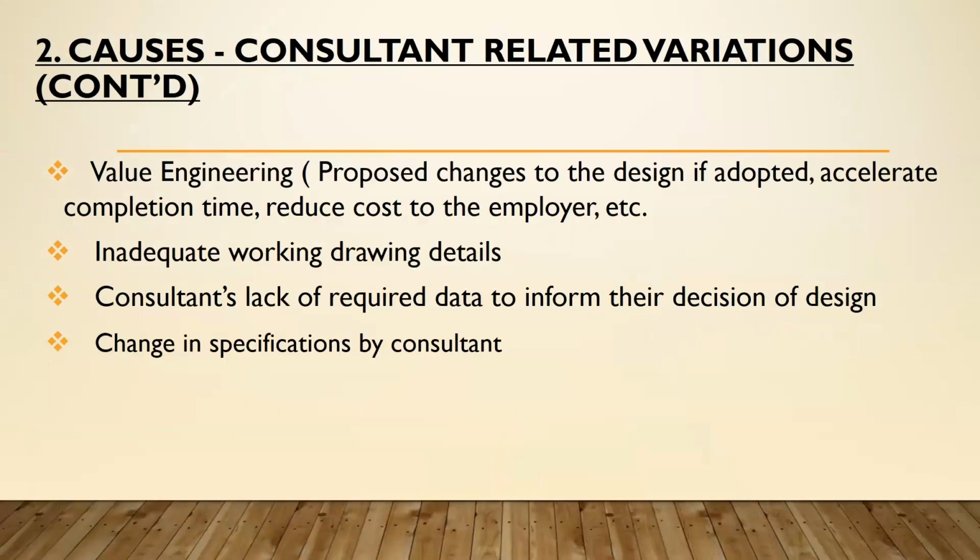Consultant may also do what we call value engineering, where he proposes changes to the design, and if adopted, may accelerate the completion time as well as reduce the cost to the employer. And this will also call for a variation.